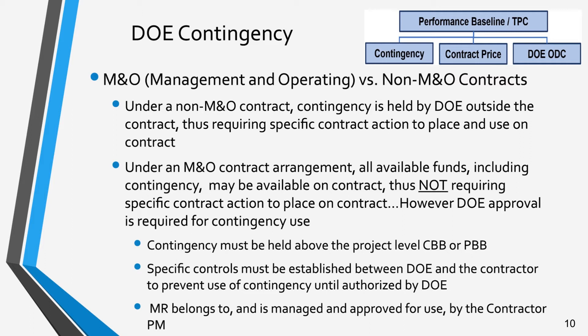Under an MNO contract arrangement, all available funds, including contingency, may be available on contract, thus not requiring specific contract action to place on contract. Nonetheless, specific written DOE approval must still be obtained for any contingency use. Specifically, contingency must be held by the MNO above the project level CBB or PBB, and explicit controls must be established between DOE, the MNO contractor management, and the project level PM for use of any contingency.